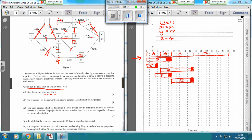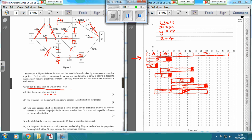I can start at 9 and it's going to take 12 days, going up to 21, but it can finish at 22 - so it's got a float of 1. J can start at 3 and it's going to take 10 days, going up to 13, and that can go up to 22.